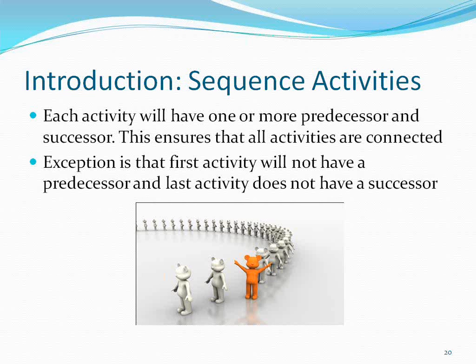So if you don't consider these things, you will consider that 19 days is your schedule of the project. But unfortunately, 10 days is for foundation, 10 days is the lag time, and then 9 days is the walls construction. So total 21 days. So if you don't sequence, you will not know these things. Is there any waiting time? No. So sequencing the activities is very, very important.